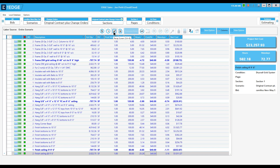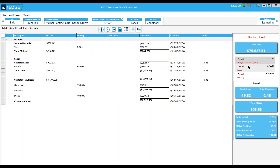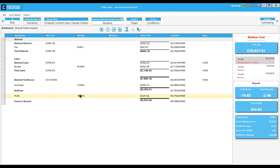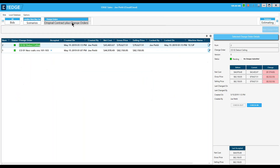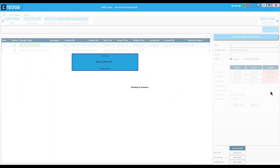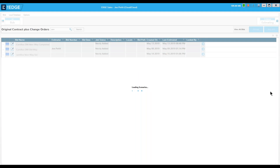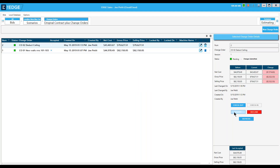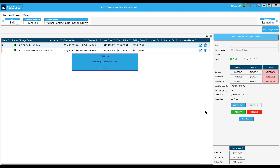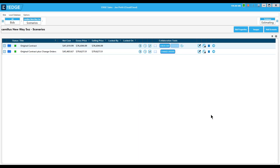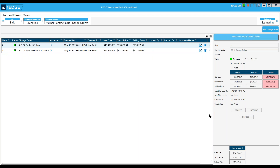Coming out to my recap screen, I see the numbers associated with this change order and the markups that came in from the previous change order — I'll leave them as is. Back on the change orders screen, I check this change order in. Notice the change numbers are in red because it's a deductive change as opposed to an additive change. I can go ahead and accept that. I just have to remember that since I accepted this and made wage changes, the next change order will carry those wage settings, and I'll need to adjust if I want it consistent with change order number one.